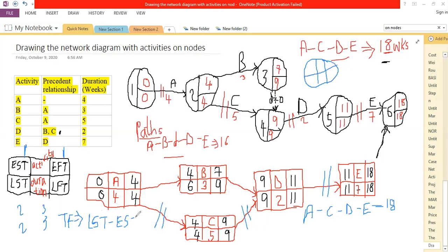If an activity is critical, you'd expect the result to be 0. If it's uncritical, of course you cannot have a 0. A good example: I've said to determine the total float, which is the most important. The others are not so important to us, but they are also there. The total float can be given by the latest start time minus the earliest start time of an activity.